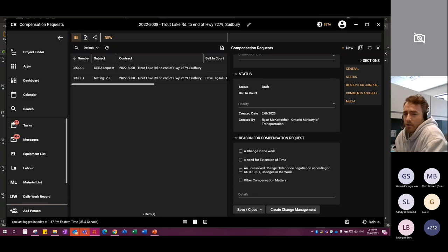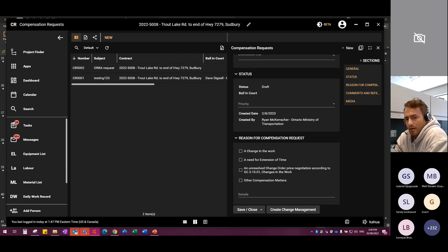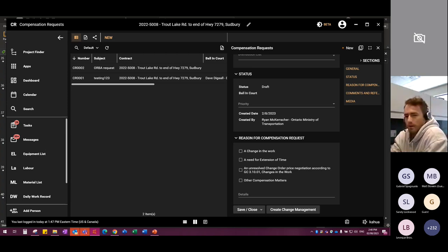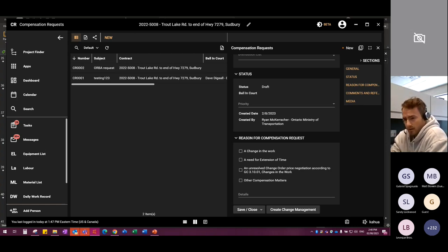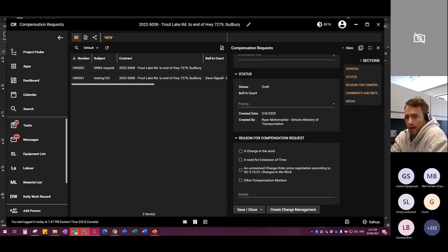Was the change order field mandatory for input in the DWR? Yes — you have to link it to either a change order or a compensation request. If you submit a CR and it later results in a change order, you can begin taking DWRs against the CR immediately. When the change order is finalized, you can then take DWRs against it too. When generating the TMSP, it pulls in DWRs linked to both the CR and the change order, catching it all up. You can also add one-off DWRs directly in the TMSP.